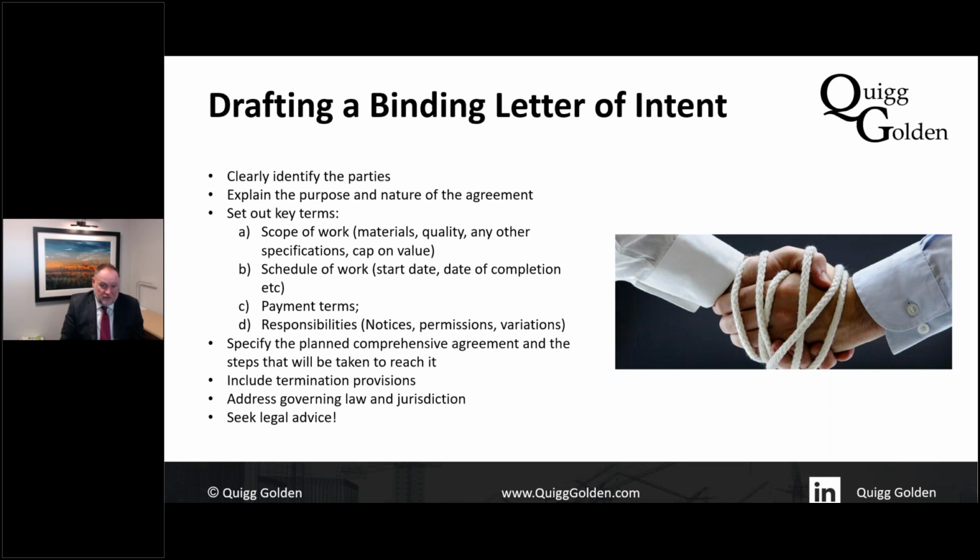Well, they never did enter into a contract, and they fell out. And British Steel said, well, you have to pay me because the letter of intent says I'll be paid on a quantum meruit for the nodes I provide. And I provide you with all the nodes you need, and therefore you have to pay me. And the judge agreed and said, yes, you have to pay this.